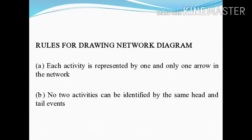Next is Rules for Drawing Network Diagram. The first rule is that each activity is represented by one and only one arrow in the network. The second rule is that no two activities can be identified by the same head and tail events.